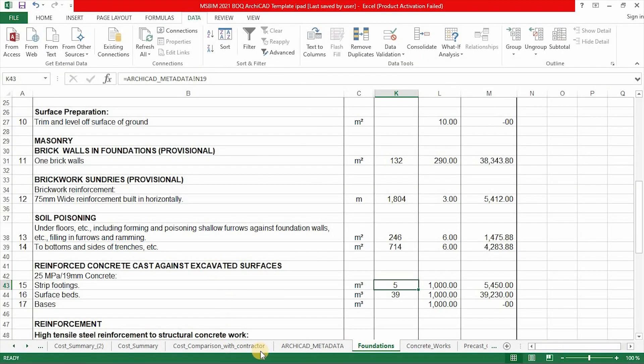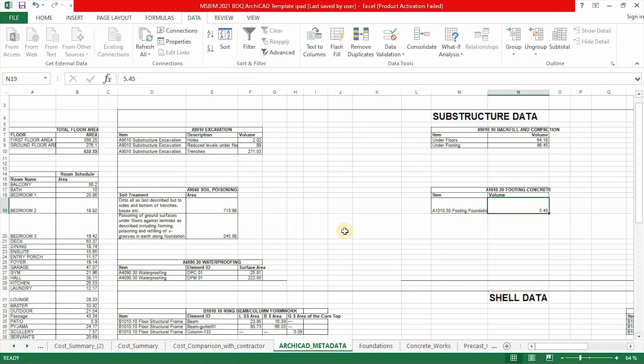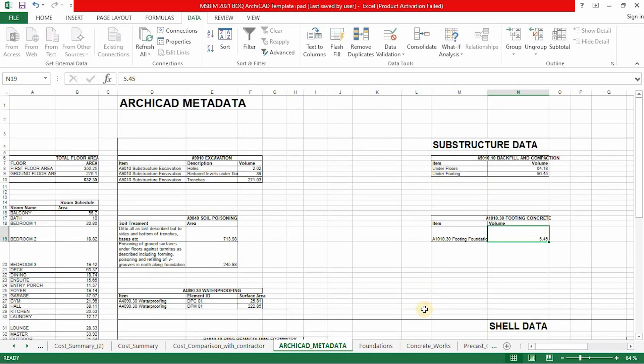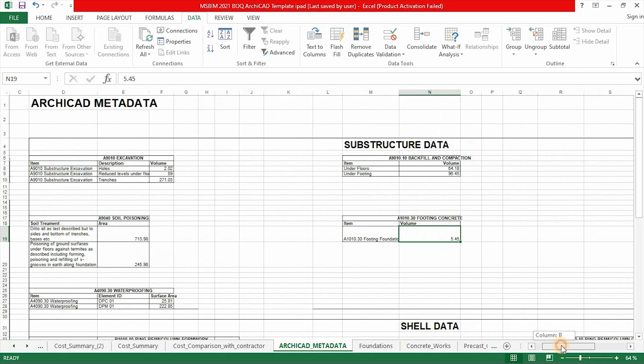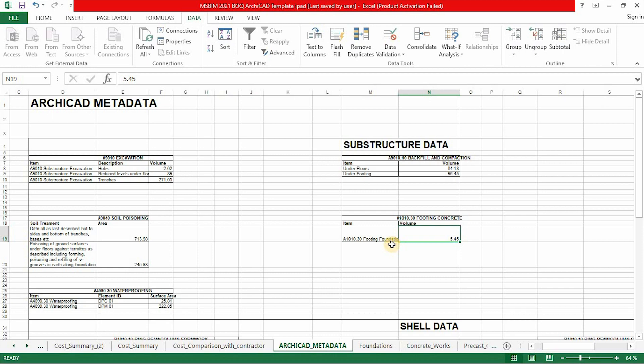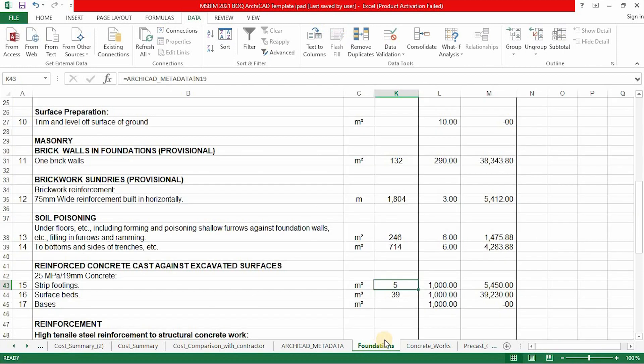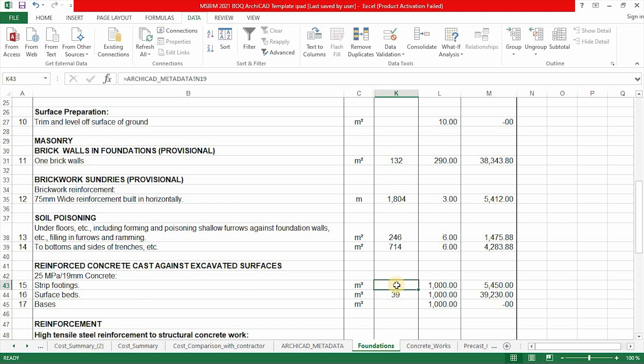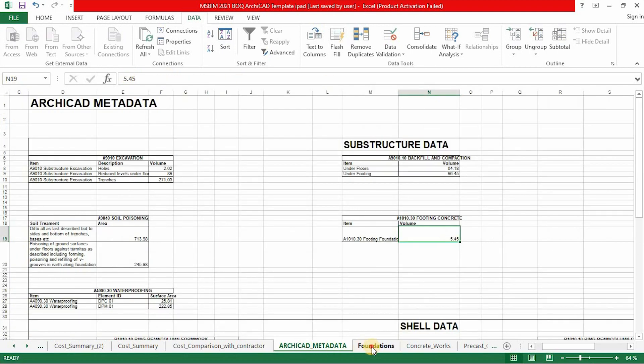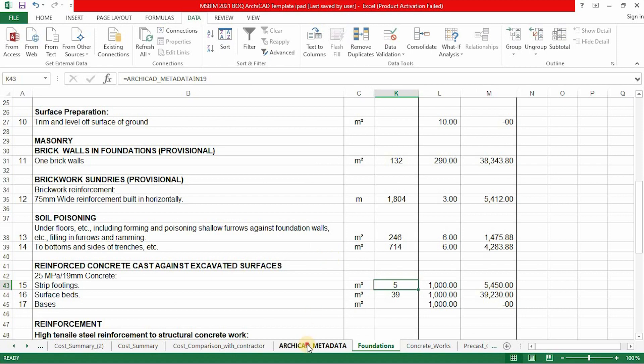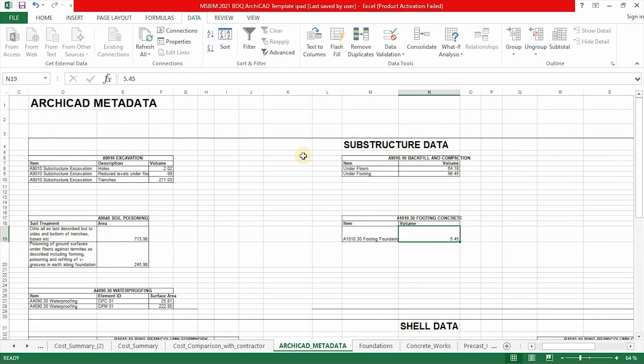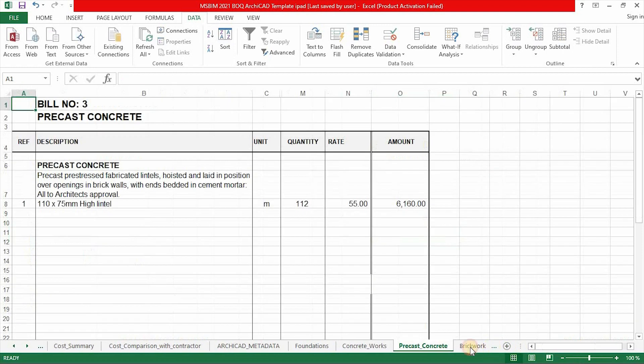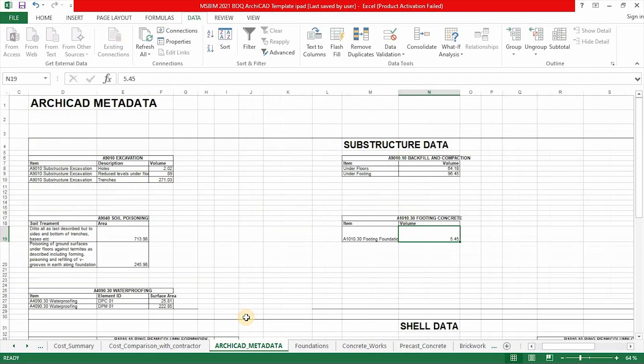And then from there, that's now where Excel spreadsheet comes into play. Under metadata, we have substructure and then the footing for foundations. This is the information we want to quantify here under reinforced concrete from our foundations. So we have different activities there. We've got strip footings and then we have surface base basis. These are all concrete works under our foundations. So if you check here, this information is being linked with the metadata. So we're going to go to the ArchiCAD metadata file from here. So whatever changes or activities that happens here, they affect all these categories of bill of quantities. I guess it makes a lot of sense.